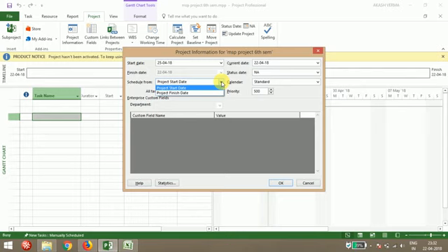If you have a project finish date, like a deadline that you have to finish your project on, suppose, 26th of May, anyhow on 26th of May, then you have to schedule your project from the project finish date, and it will go in the reverse direction. This is the rare case, it doesn't happen all the time. So I'm going with project start date only.